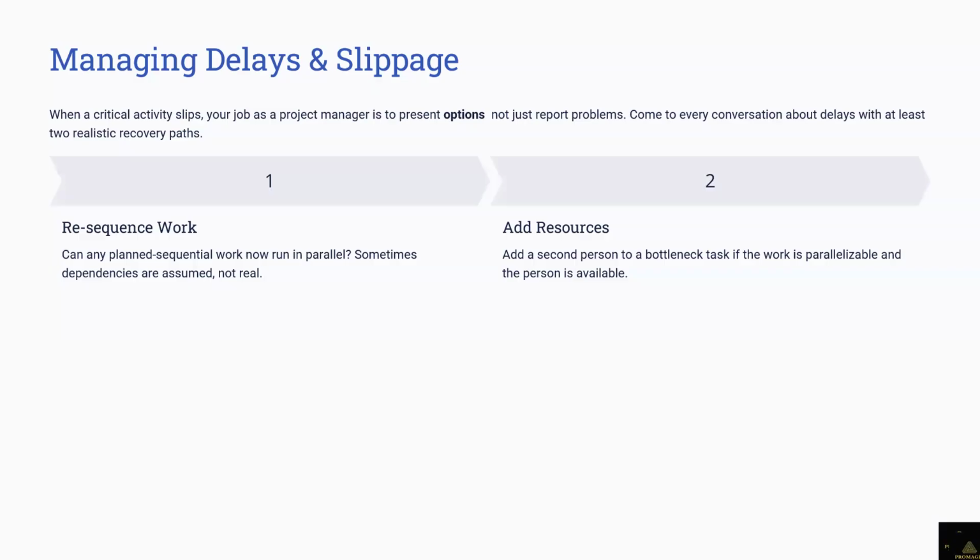Okay, you do that, and your schedule will automatically level up. It's something called resource leveling. Your schedule might adjust to that mid 5th day, and you see that. So you now look at maybe additional resources. And again, if we work overtime, you can add the resources. Those are two things I've mentioned: adding resources or working overtime. You can do either, or you can do both.